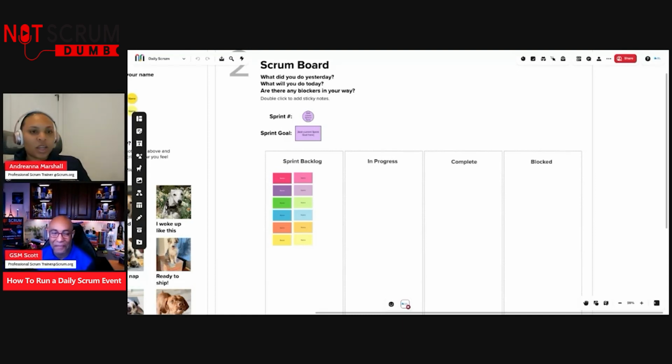And so the next way I think is very interesting. If you want to increase engagement and active listening, potentially do silent updates. Team members can write their updates on sticky notes, for example, on a Mural board here, and each team member reads out others' updates, promoting active listening and engagement.